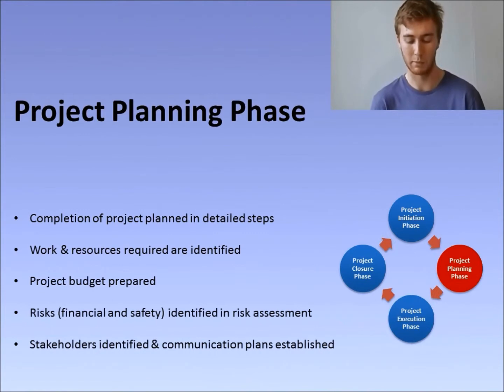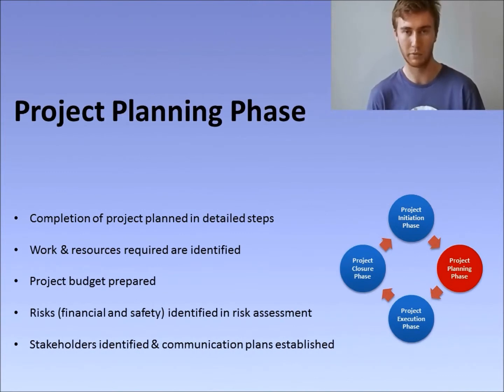A risk assessment must be performed to identify any risks, as well as the impact of said risk occurring. Solutions must be provided to all identified risks to decrease the likelihood of their occurrence or to minimise the impact. Additionally, all stakeholders must be identified and communication plans must be established between all stakeholders.